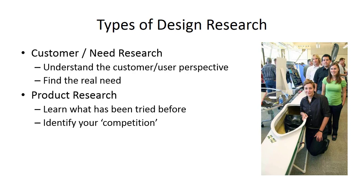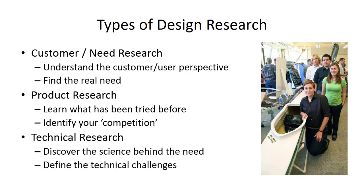In addition, there's product research. There's always been something tried before, so learn from that. Identify what you're competing against, whether it's an actual product that's available or a process being used as a workaround right now — that's your competition, and you want to make sure you're better than that. And then there's technical research. Any design is going to have some technical challenge. You want to figure out what the core of that problem is — what is the science behind it, what is physically causing this problem. When you understand that, you can get more detailed information about good solutions.